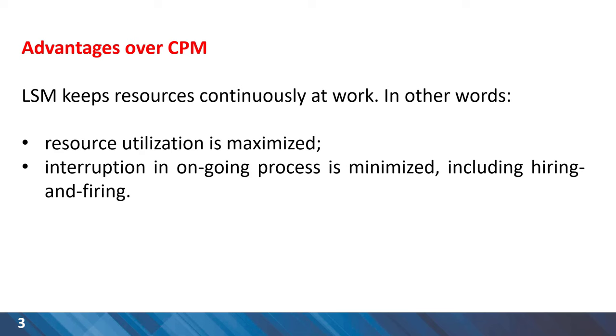There are a couple of advantages that LSM has in linear projects over the traditional critical path method or CPM. These include but are not limited to maximization of resource utilization and minimizing the interruptions in ongoing processes. In an example we will be seeing these advantages.